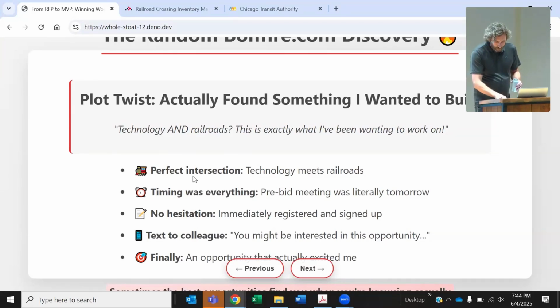The important thing is not only was it a software development cycle, but it also had a field verification segment. So all the 700 crossings have to be inventoried, updated, and verified to basically probably 5 nines, right? No errors. And that's a lot of data to compile. And that's a lot of work. That's almost more work than the software dev. So if you ask any of the software firms around here, they don't want to go in the field and verify data, right? So you definitely have to have a cross-functional team right away.